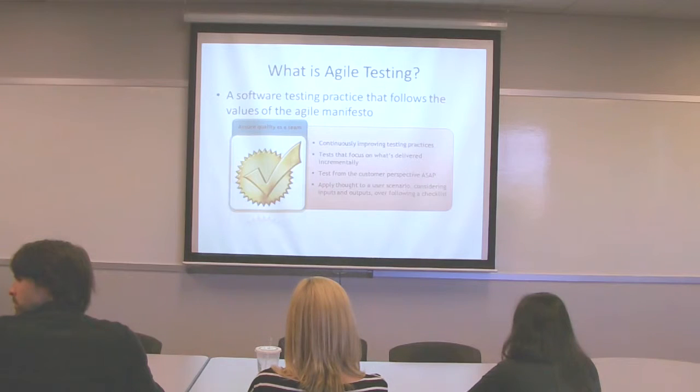So we came up with a process wherein the developers and the testers follow the regular Agile processes. We will have daily stand-up meetings. Although it is in New York time, we adjusted a time. We will have 2-week iterations. Although it's a huge chunk of requirements, we divide it up into user stories.